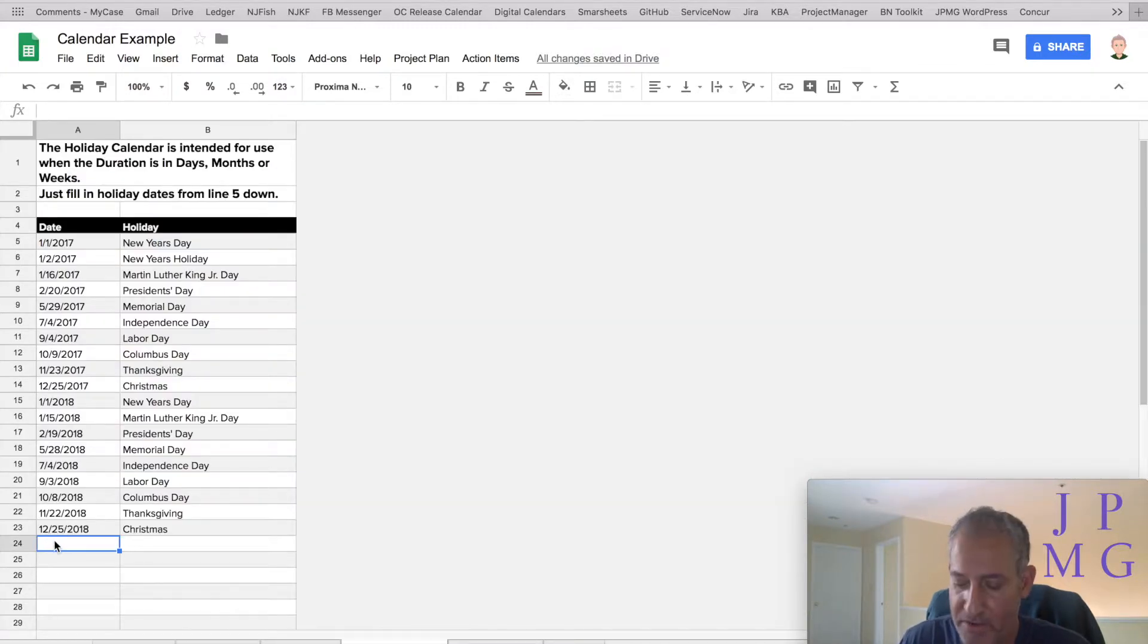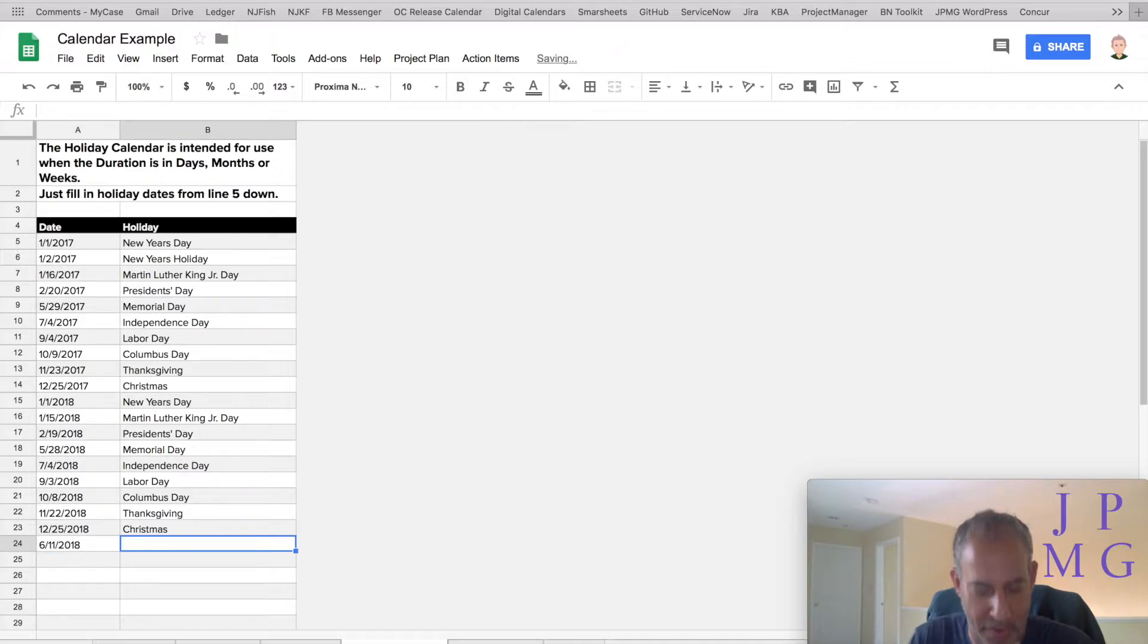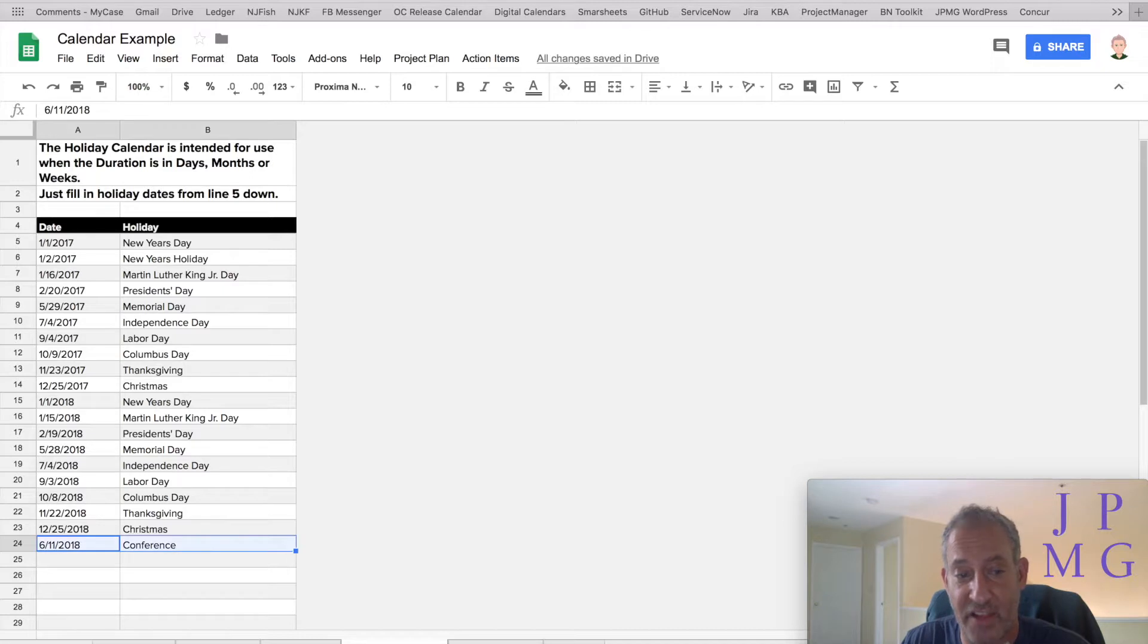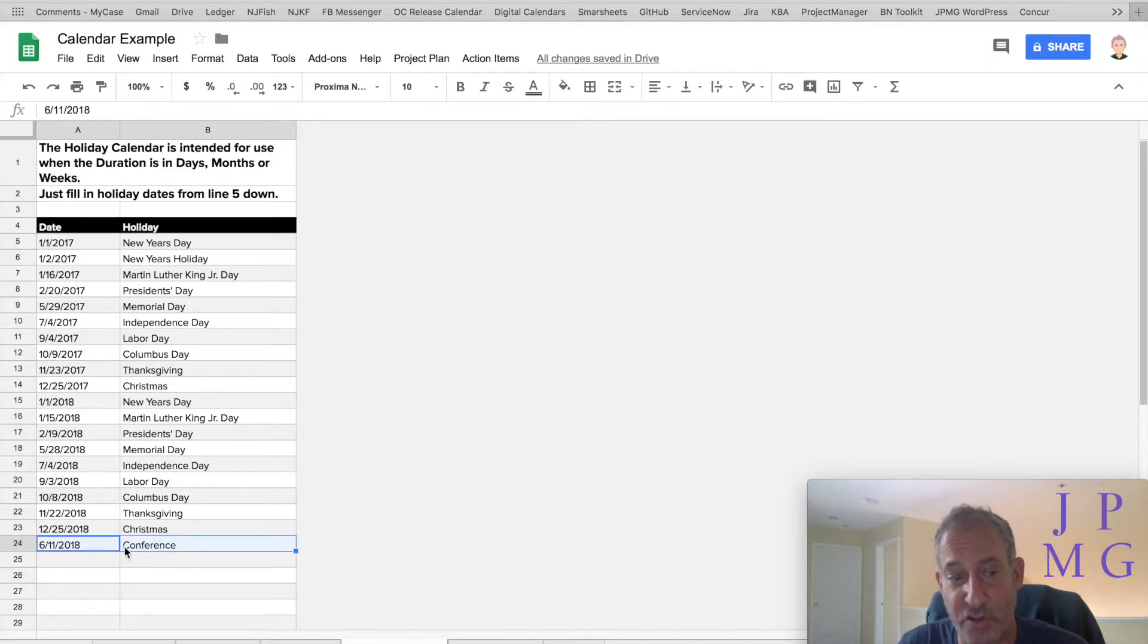We're going to enter 6/11 here and we're going to put conference. Now, every day that they're at the conference, we need to enter in that holiday calendar. The easy way to do this is enter just one day,